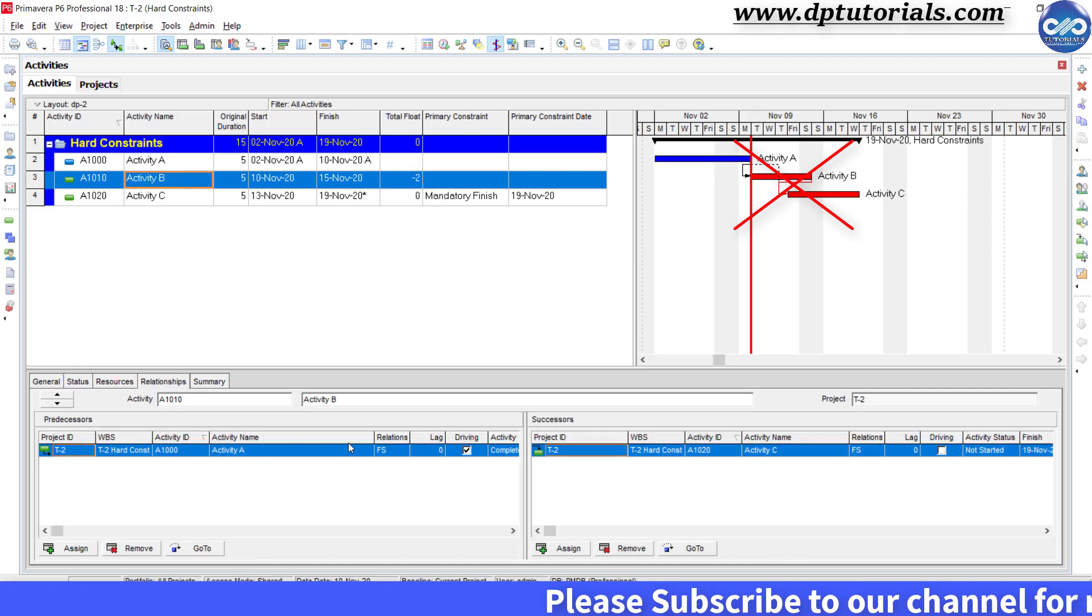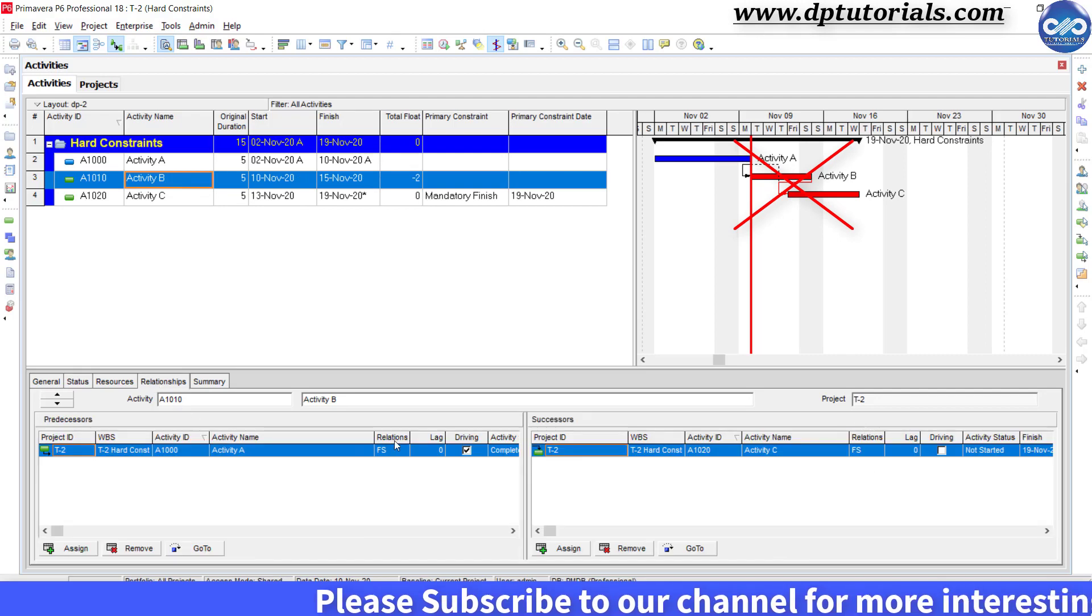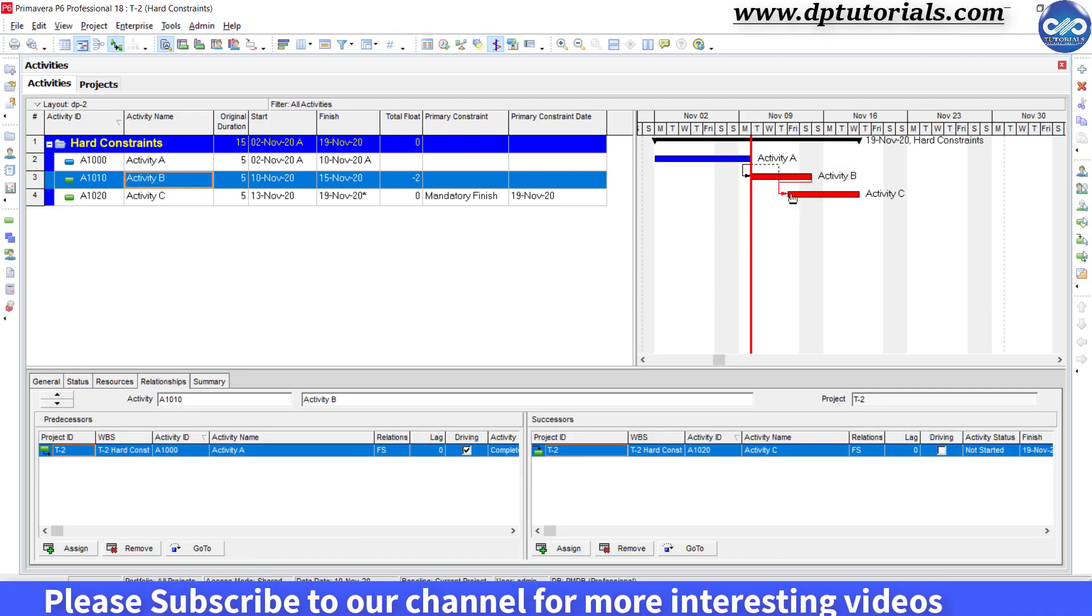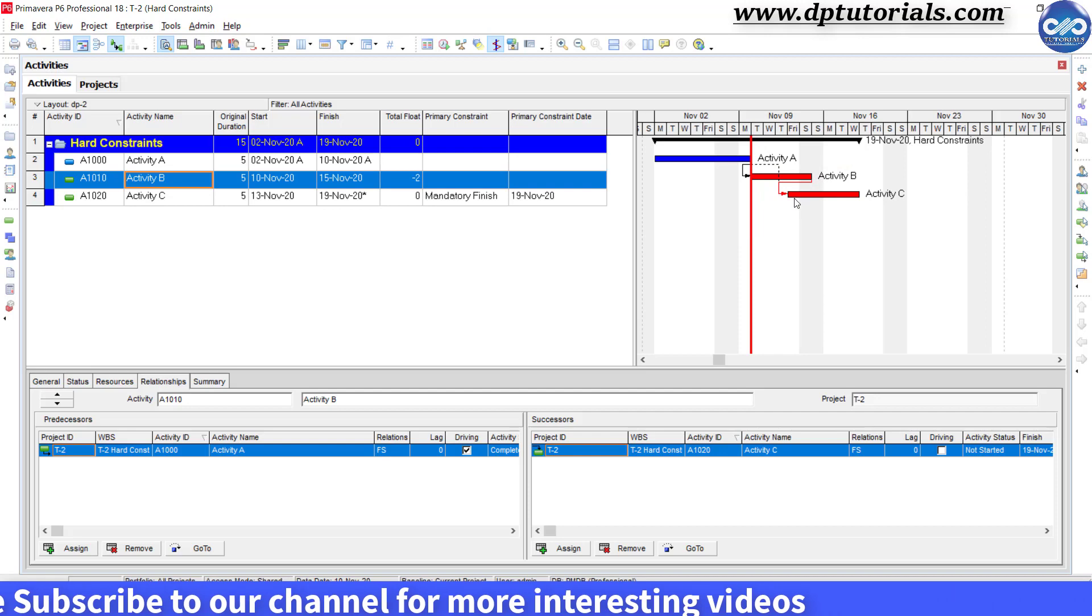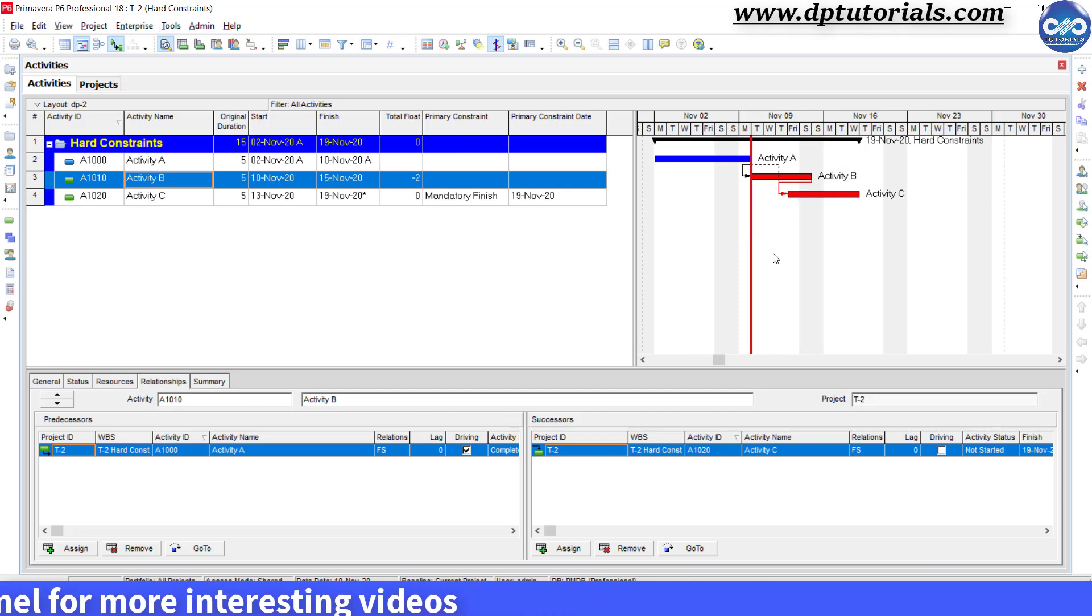The same can be seen in the Gantt chart. See, the activity C is being shown as commencing before the finish of the activity B.